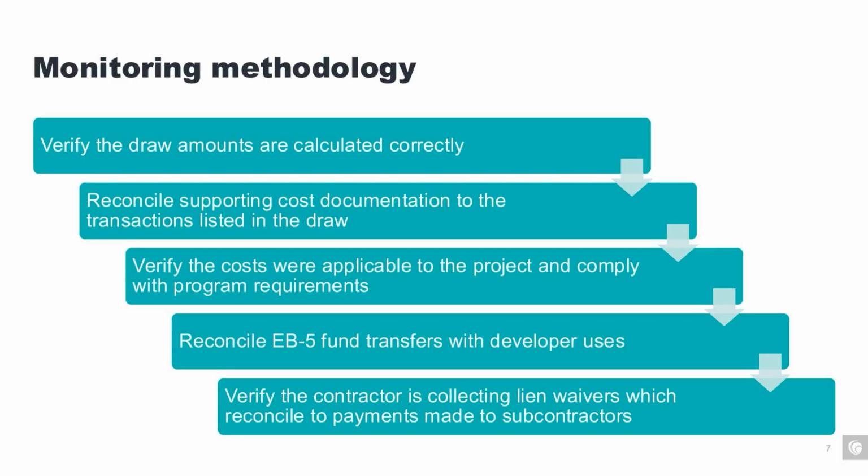So in addition to looking at those source documents, it becomes an important element to determine, are the costs that are being passed through for the last 4 weeks or last 30 days, do these costs really belong on this project? Do we see equipment rentals for equipment that's really on this project? When we see invoices for a project that's being built in Florida, but the rental invoices say South Carolina, well, clearly someone made an error, and those errors need to be elevated and rectified before a report can be issued.